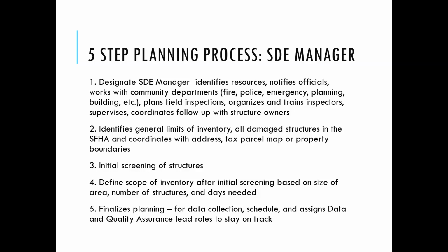So making sure officials are notified. We definitely want police to know that you're going to be entering people's structures, identifying the resources, working with the other departments, planning the field inspections, like which teams are going to go to which properties, and making sure you have the full list of properties that you're going to need to assess, training the inspectors, working with them, making sure everybody's on the same page and will provide consistent data on doing the assessments. And then they're supervising that and coordinating with any follow-up,